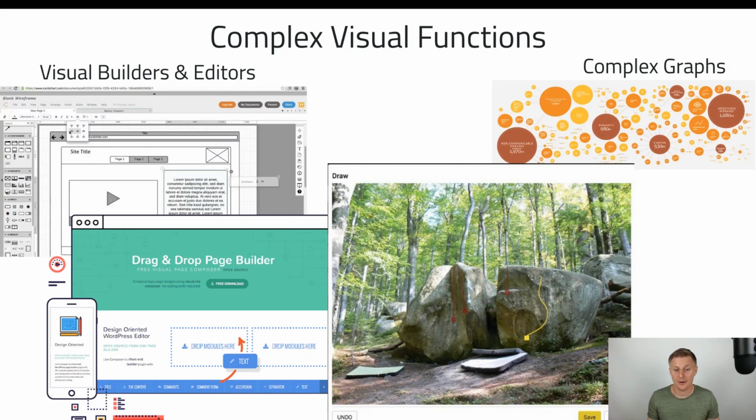It is a prototype of Roads Builder we created for one of our clients. It allows staff members to upload photos with cracks and draw roads on it. This is not a super challenging task, but it took us a couple of days to build and then adjust it a few more times. So you need to know that complex visual elements and widgets might have some unexpected issues for developers, and thus we usually put extra reserved time for its implementation.